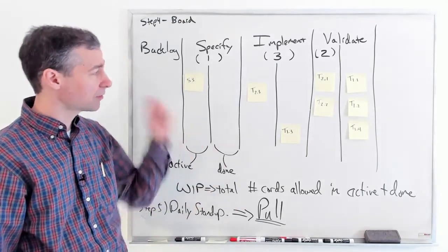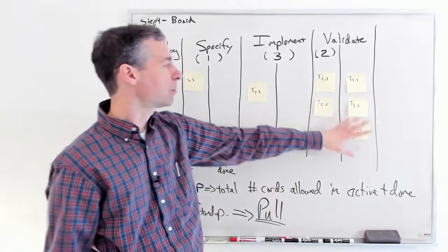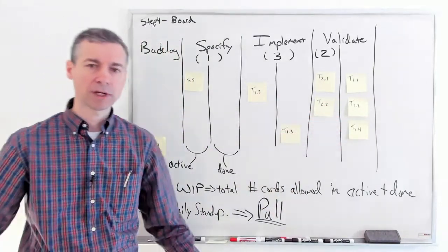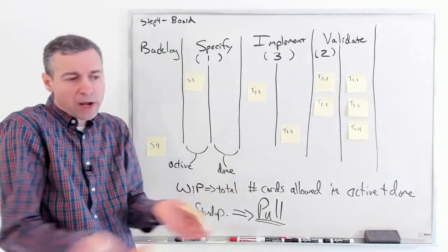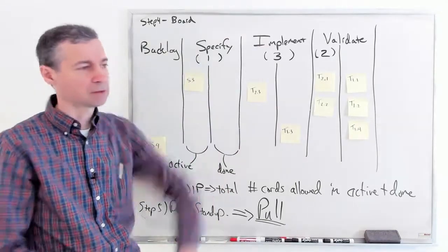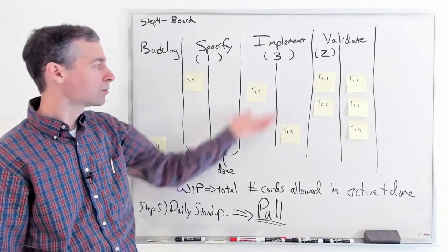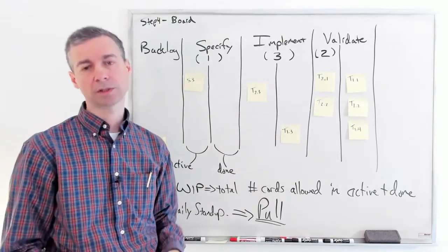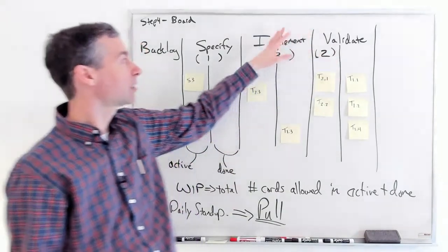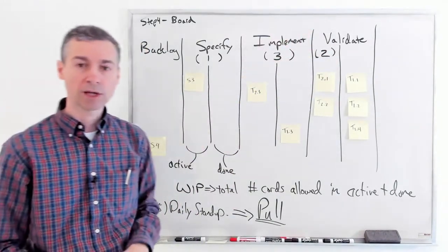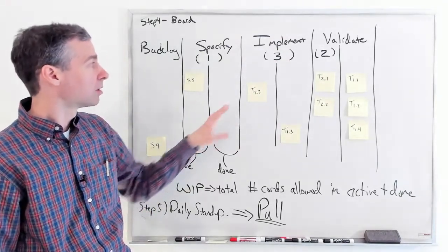If you were to have a situation where, let's say, the Validate people were just always sitting around, they kept talking about how we can't get anything. Why is everything stuck at Implement? That's the discussion. What's going on in Implement? These tasks might be taking Implement a really long time. So maybe we'll actually move someone from Validate into Implement to allow them to process work faster.